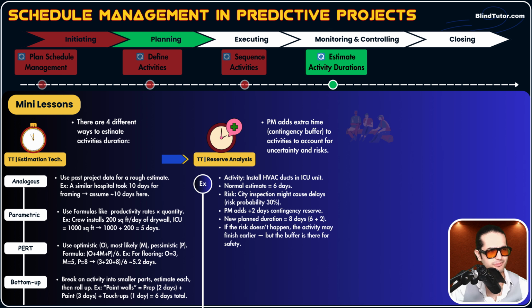especially your sponsor. Hey, why did you finish it later? Why didn't you consider contingency reserve if there was a winter, a harsh winter, or if you knew that the supplier will delay, why didn't you consider that in your estimation and calculations? Okay? So, reserve analysis is all about considering those uncertainties, supplier delay, harsh winters, regulatory delay, and other risks that we may have. Or maybe our resources, some of team employees will leave us. Okay, we need to consider these.